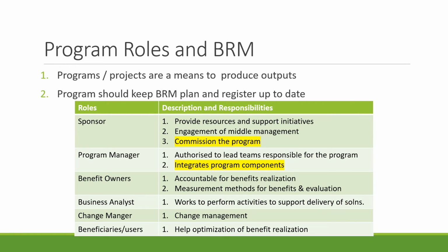There is a change manager role available at program level. They are responsible for change management, implementing changes in a structured and planned way, and approving them in a structured way. They may introduce the change control board, and all the changes go via the change control board.